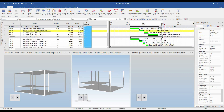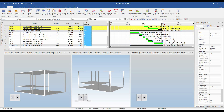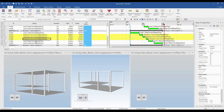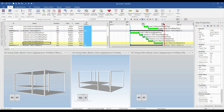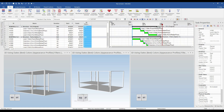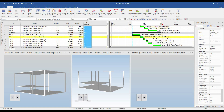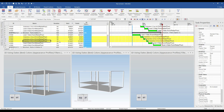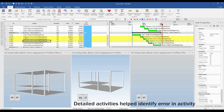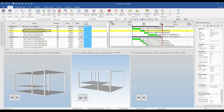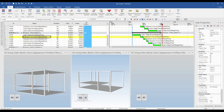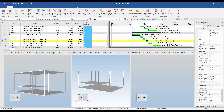Dividing the original schedule into more detail, we follow the same sequence: slab, then columns, then level two and level four slab. By dividing the column activity into detailed activities by level, we modified the duration a little. This helped us identify that six days for all the columns was not actually enough — it will actually take four days for each group of columns.